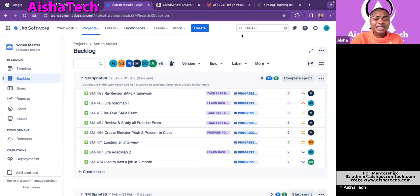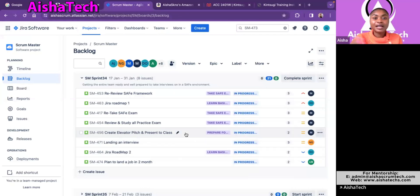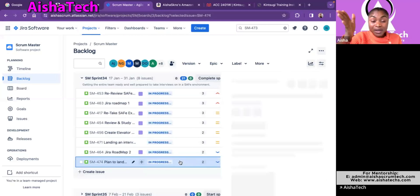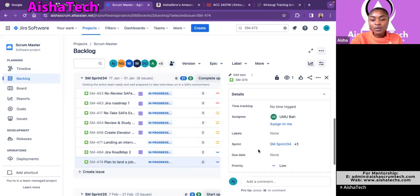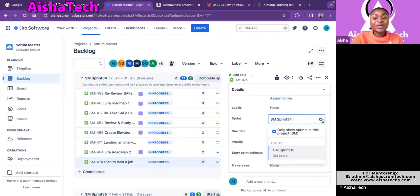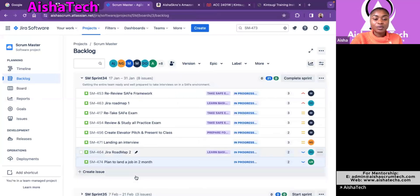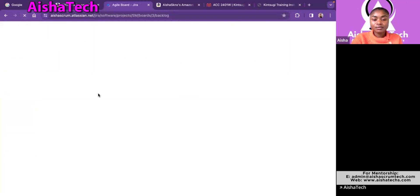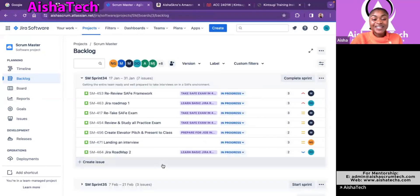So let's say you don't want to open or search at the top here. You just want to have this quick way to do it too without searching it at the top to remove a story. From an active sprint to the product backlog or sprint backlog or any other backlog, I'll set the active sprint. So I'm going to select on this story itself to open it on this side. When I select on that too, I scroll all the way down to sprint right here too. And when I select on that, you can also X it out, X out. And when you X out, this story on 474, when you X out, it's also going to let, I'm going to have to refresh. When I refresh, it's going to take it out of the sprint. Then you refresh your screen. And when you refresh your screen, you're going to see that the story also disappears.